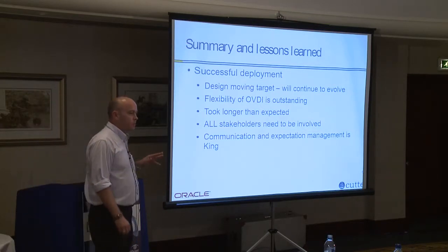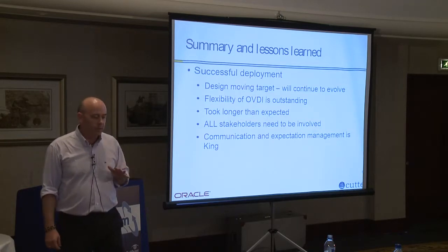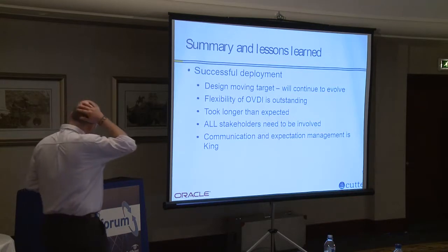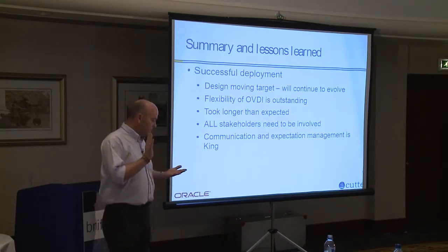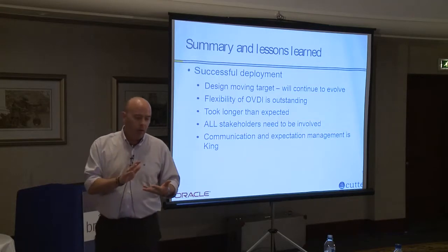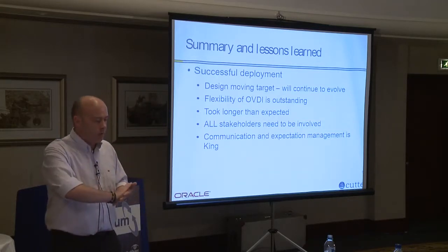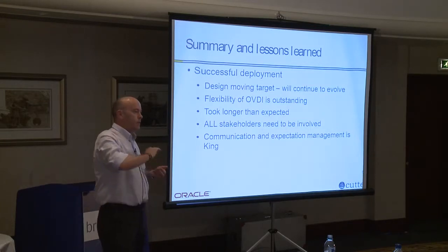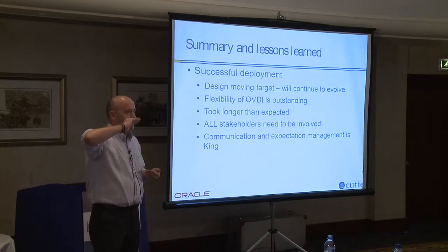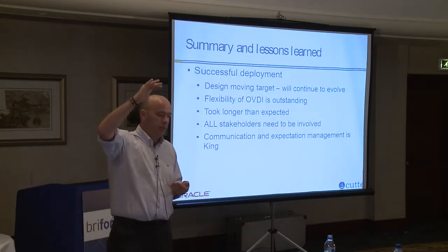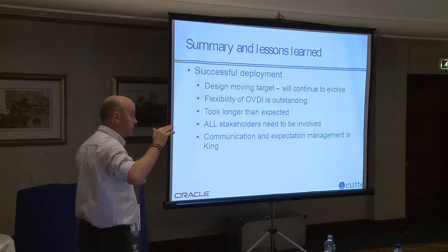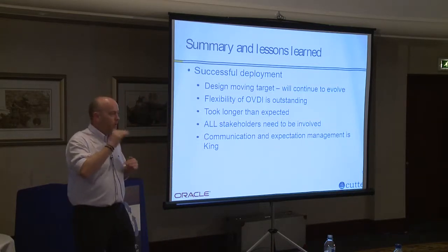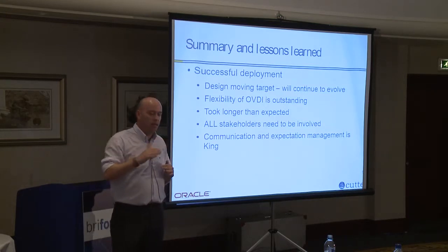Little ones, 200, 300, 400 seats, they're not that problematic. Multiple 1,000-seat deployments are interesting. Nay hair. All the stakeholders need to be involved, and this is something that we learned actually the hard way with the council. We thought we had the stakeholder stack pretty much squared away, but actually how deep the implications of this deployment went within the council infrastructure were a lot bigger than they were expecting and a lot bigger than we were expecting, which is why I go back to a few slides ago where it's make sure you've identified the key stakeholders and get them engaged early.